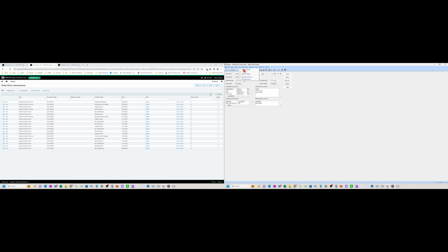So markup tables are more for percentages. So I want to mark up my material at a specific cost or a specific percentage. If I have 10 grand come in the door, I mark it up at 10%, for example. Okay. Or if you want to put G&A overhead allocations on top of some of your costs.